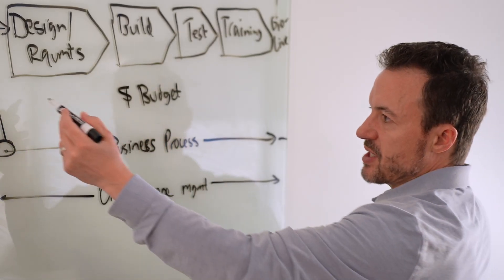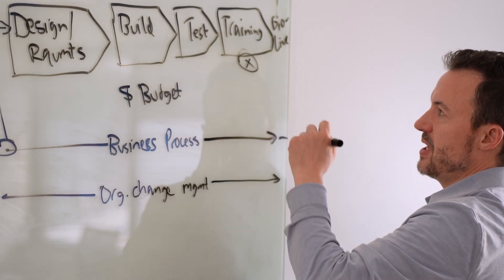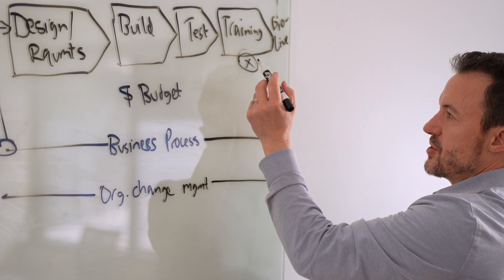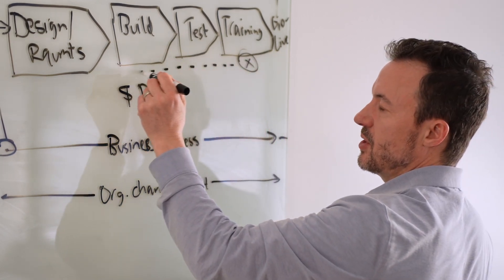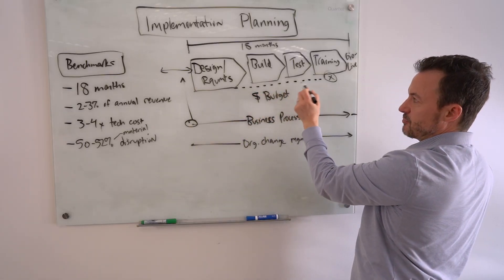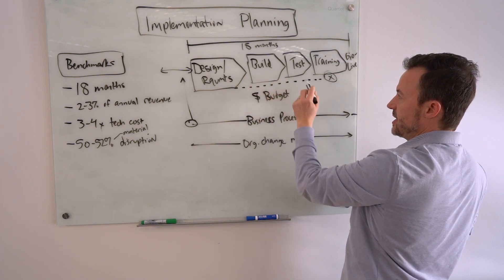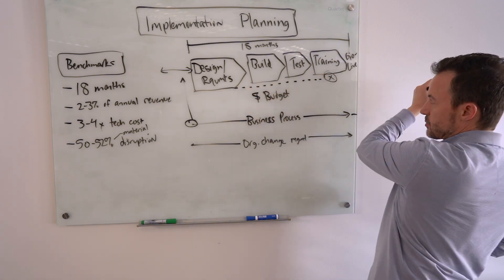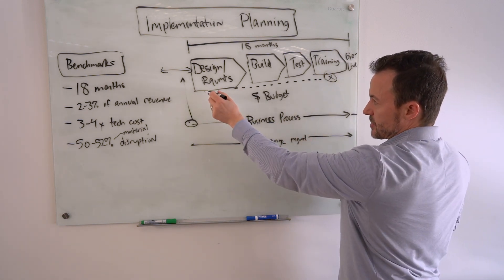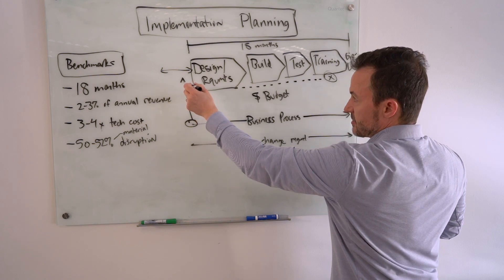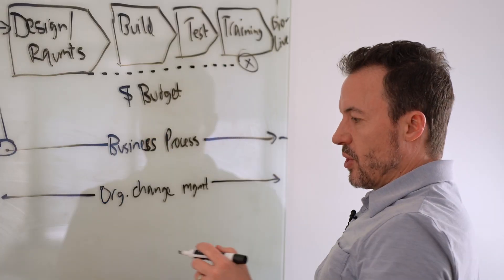Another critical missing component is organizational change management. Change management needs to be happening in parallel throughout the entire implementation — not just at the training phase. If you wait until late in the project to address change management, you've allowed resistance to build up along the way. Starting change management as early as possible — during the pre-implementation and business process phases — is essential to keeping the project on track.